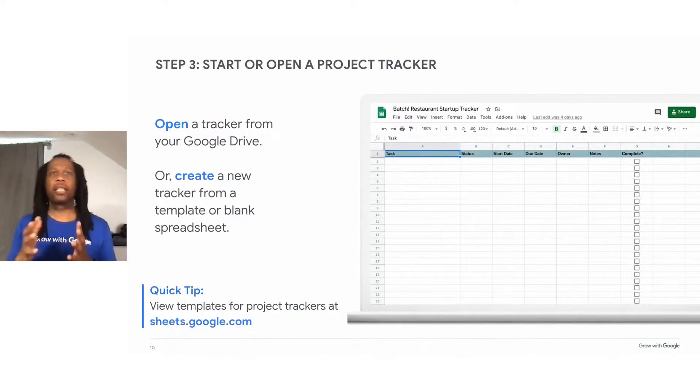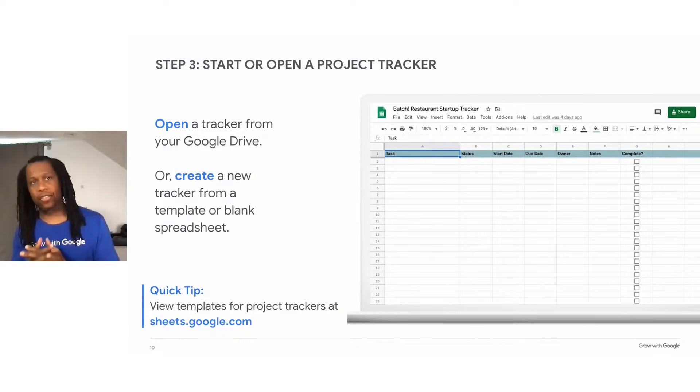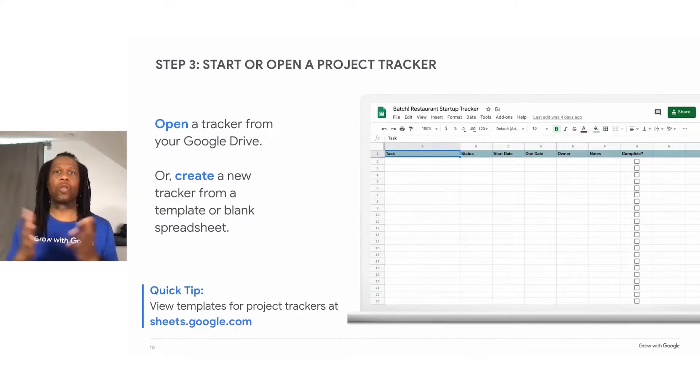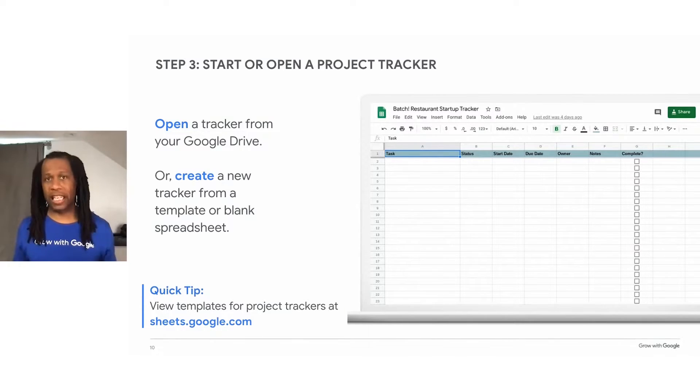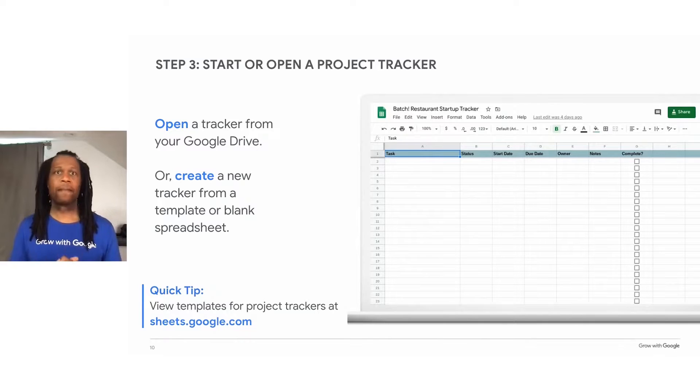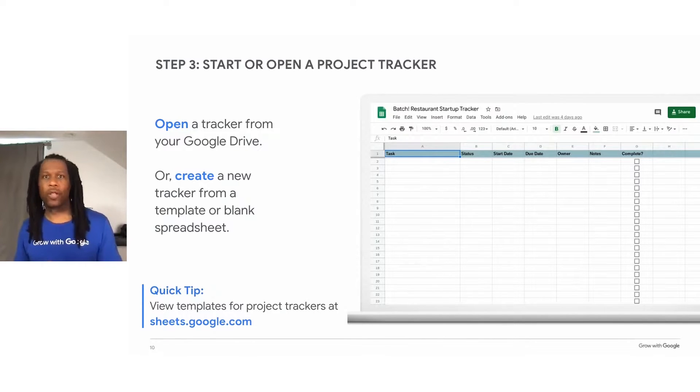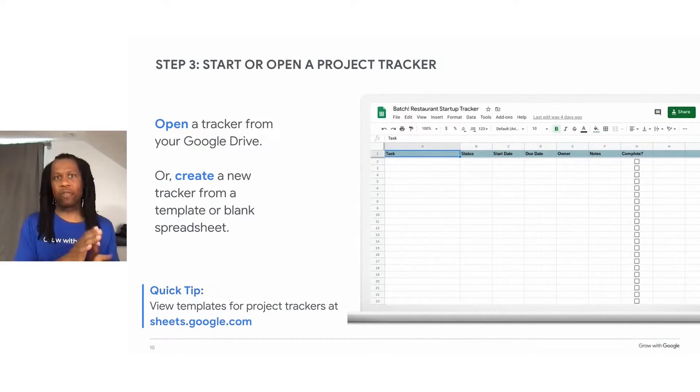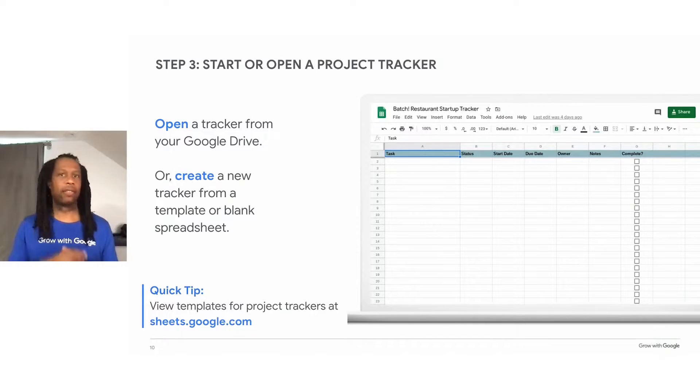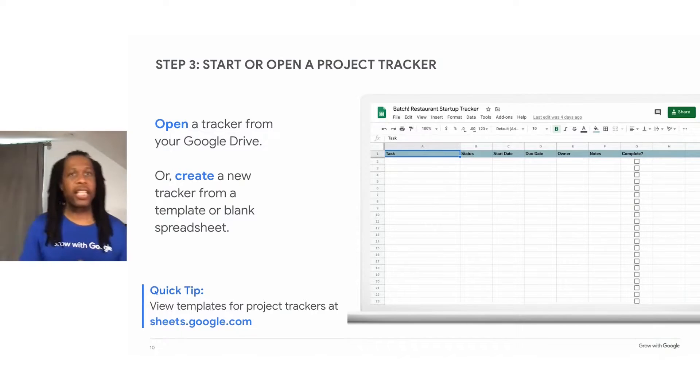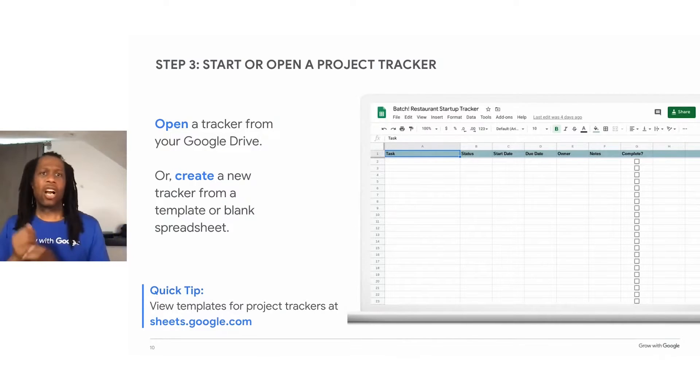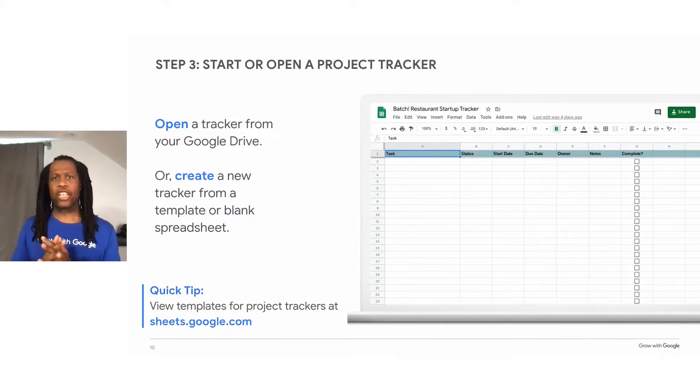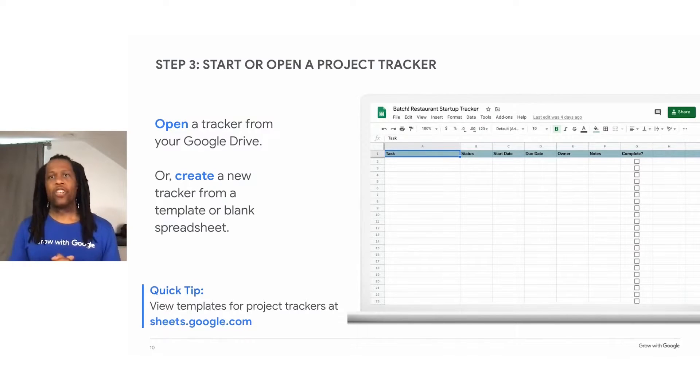So like I said before, we have our task, status, which is simply the progress of those tasks, the date the task started, the date the task is actually due, the owner of the tasks, who is the person who is actually responsible for that task, a column for notes to record additional information related to each task, and a column that shows when the task is complete with a simple checkbox.